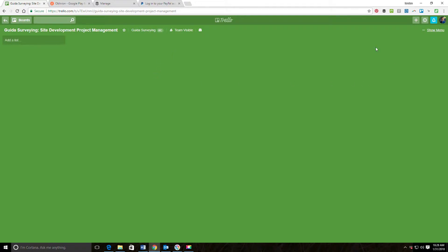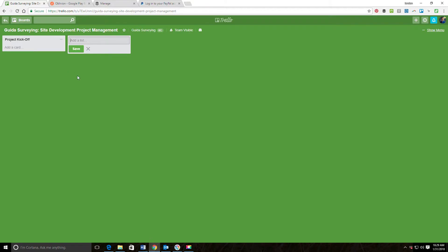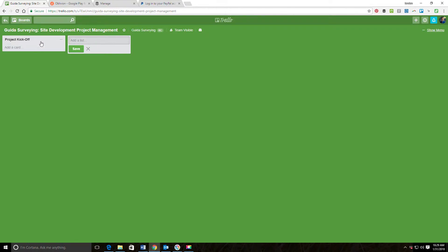Once you have your board created, the next step is to add a list for each major phase in the project. I'm going to add my first list here and call it Project Kickoff. I'm going to start this particular workflow after the proposal's been done, the contract's been executed, we've got notice to proceed. One of the very first things I want to do is have a project kickoff meeting with the members of my team that are going to be working on the project.